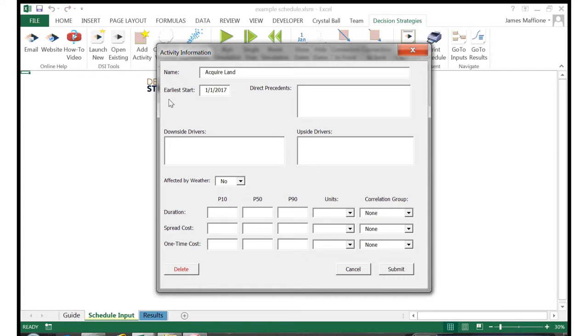Now, before I get to the numerical forecast, I want to come to these text fields and describe the conditions that drive the favorable and unfavorable outcome. In our consulting, we call this a premortem. I tell you that the result was particularly bad, and then you tell me what must have happened. This helps us to expand our thinking and remove bias when we do get to talking numbers. For our example, I'll just paste in some comments, and we can say that they came from our expert interview with the company Landman.